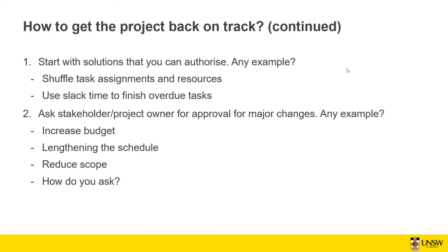You need to provide them with all the information and all the solutions that you've tried, and ask for a meeting. If it's an emergency, ask them to meet soon, and then discuss what you've done so far. See first of all if they have any ideas, if there's any other solution that you haven't tried so far. If not, then you can discuss how much money you need in order to increase the budget, and how you want to spend that money is also important.